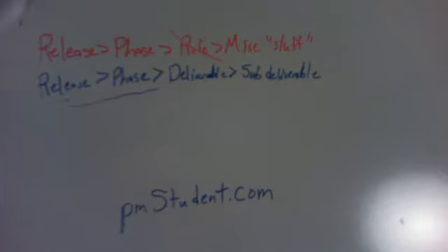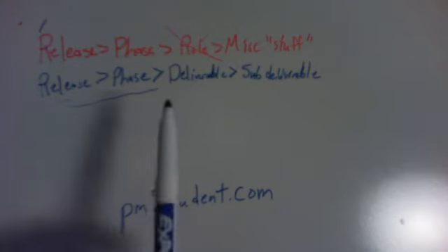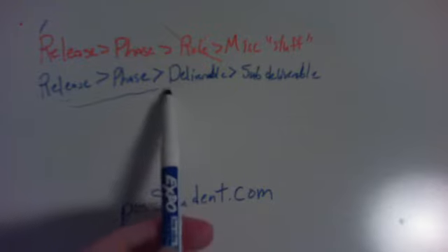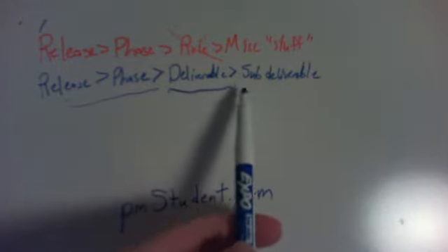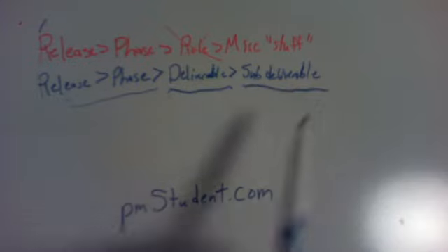So this is really kind of a project in and of itself, but above here we've got deliverables. We've got a major segment that's getting delivered, essentially a subsystem, and then above that is a system, and so on and so forth. So we broke things down into deliverables, and after we did that, some things landed at this level, and some things got broken down into subdeliverables.